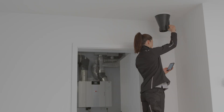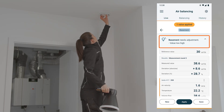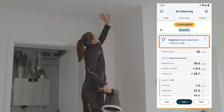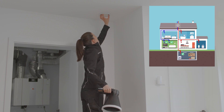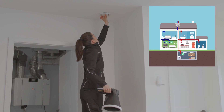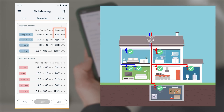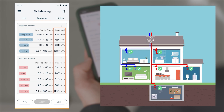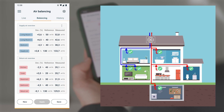Further measurement rounds are carried out according to this procedure. The app makes a recommendation in each subsequent measurement round, and these specific outlets can then be adjusted. The procedure is continued until all target volume flows of the outlets correspond to the reference. The number of measurement rounds can vary, and the app recommendations help to reduce the number of measurement rounds.